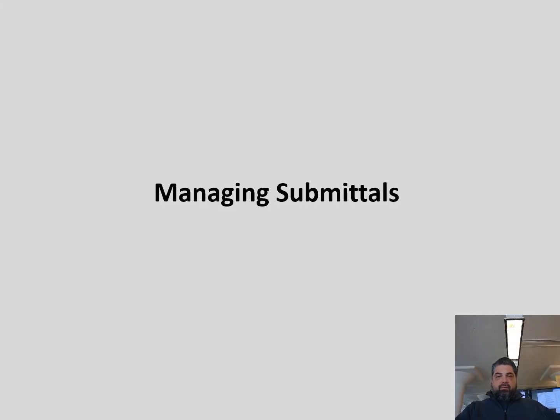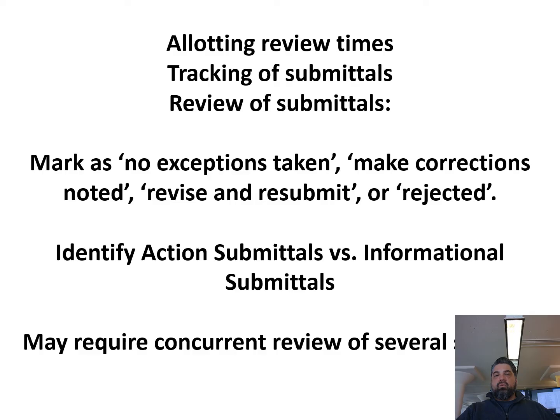Submittals. So managing submittals, they come in, submittals are the hot potato because you don't want those in your lap for very long. And typically by contract, we allow for 14 days. And so that's what we ask the contractor to allow us for each submittal, right? 14 days.